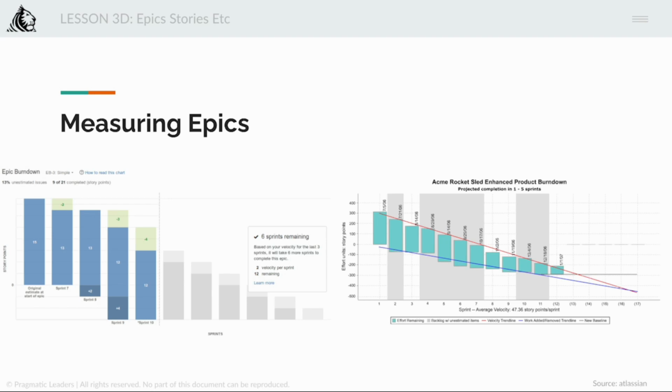Okay. So scope creep, another concept that you need to know is scope creep. Which is something which product managers are also guilty of, but typically business managers are usually guilty of. So scope creep is the injection of more requirements into a previously defined project. For example, you defined that in this sprint I'm going to do only this much. Okay, everything got decided, Friday we went home, Monday work was supposed to start. And on Monday afternoon or evening, we got a mail saying that, hey, we also need to deliver XYZ. And suddenly the entire sprint plan went for a toss. Correct? What was supposed to happen in a week will now take 10 days, and then people will come back to you saying how did it take 10 days. Correct? That is scope creep.